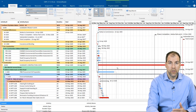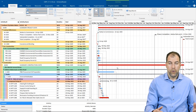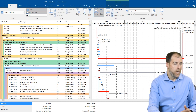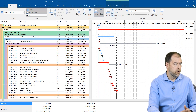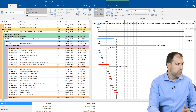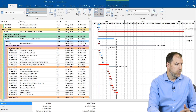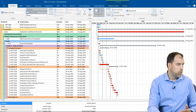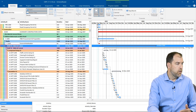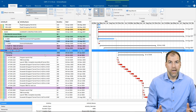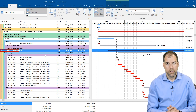Any construction engineering project is going to be broken down into some sort of work organization system — the phases of the project or different areas. That's called the work breakdown structure. On the left you can see the colored bars that break the work down. Here's construction broken down into the water main, broken down further into the different shafts, and within a specific shaft the work that will happen: the compound setup and the excavation. If we start to roll things up we'll see that structure repeated throughout the project. It helps us organize all of the work — really important to understand.